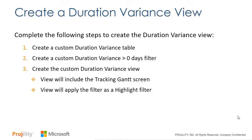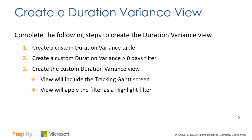In this webinar, I will create the custom duration variance view by completing the following steps. First, I'll create a custom duration variance table that includes the columns we need to see. Then I'll create a custom duration variance is greater than zero days filter to show only the tasks we want to see. Finally, I'll create the custom duration variance view with the following features. The view will include the tracking Gantt screen on the right, and the view will apply the filter as a highlight filter.